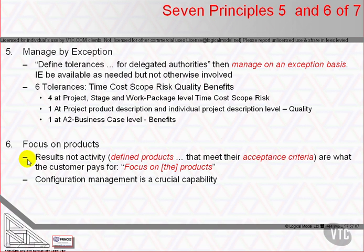A set of products to be produced is agreed before activity to create them starts. The project's products define the project's scope and dictate the activities to be scheduled and budgeted, tracked and reported. Each product is defined in a product description that describes the product's purpose, composition, derivation, format, quality criteria, and quality testing methods. The product description's content is therefore a sound basis for estimating effort and resource requirements, and for determining the dependencies and scheduling the activities that create or acquire the products in the project's scope.